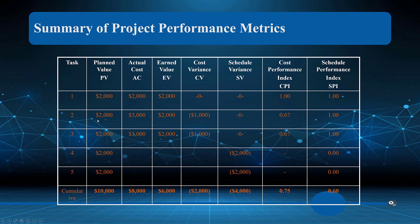As we look further, the problem becomes apparent at task two. If we add up tasks one and two we'd be at four thousand planned versus five thousand actual — still negative one thousand. Task two is where that variance originates, with an SPI of 0.67. Tasks three, four, and five show the same pattern — we used six thousand earned value and ten thousand planned value to derive these figures.